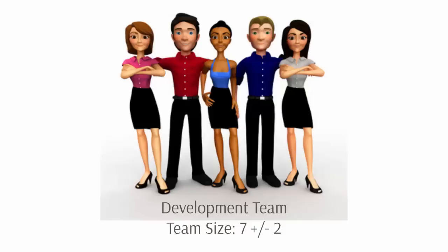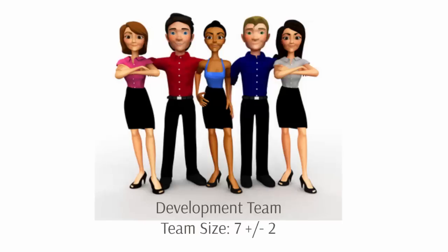The development team is a cross-functional, self-organizing team. They focus more on how the feature is to be developed. Optimal team size is 7 ± 2.